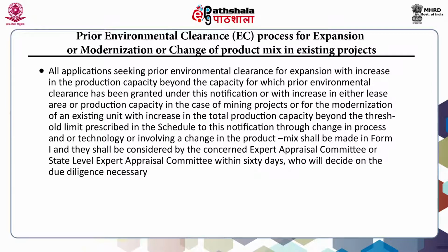They shall be considered by the concerned Expert Appraisal Committee or State Level Expert Appraisal Committee within 60 days, who will decide on the due diligence necessary, including preparation of EIA and public consultations, and the application shall be appraised accordingly for grant of environmental clearance.